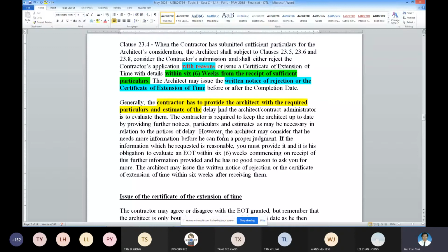You're allowed to revise because nobody can stop the contractor from revising the working program. So this is the second type of revision. But in the second type, you shouldn't exceed the time that is allowed at whichever project phase. This is an important principle.